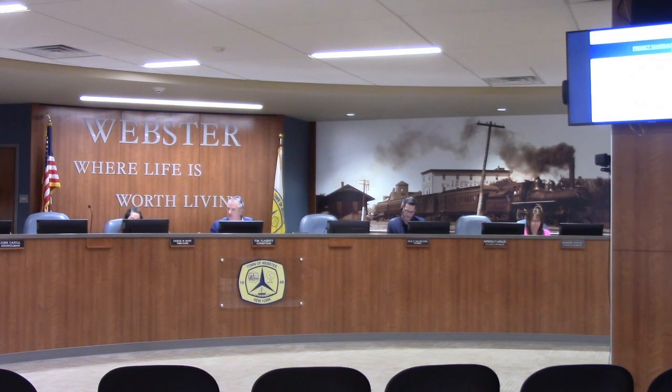The project was bonded for $7.1 million, I think. And when it came in, it was going to be at about $6.3 million. So Coke Fairlife, the one thing that I've said and pounded in, I don't care what happens on this, and then let me finish that statement, as long as you let Coke Fairlife know every step of the way, they need to know every contingency move, every change order, because they're paying 96% of it. And Coke Fairlife is like, we need this project done yesterday. They wanted this thing done in December of 2024 because their schedule was to start putting flow down through there on a test basis in April of 25.